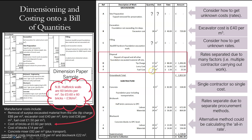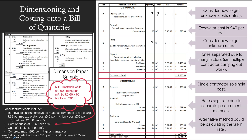I've separated out disposal because the lorry cost is one thing, the fuel cost is another, and my tip charge is another. My tip charge might be from one company while my lorry and fuel might be from two separate companies, so I do separate those out. You might want to have them all in one if you've got one company doing the whole thing — it's all up to you how you put this information into your bill of quantities, whether you separate everything out completely or use an all-in rate.